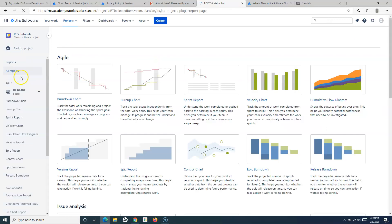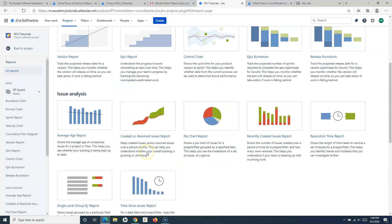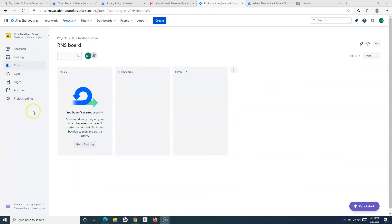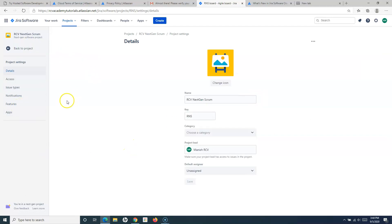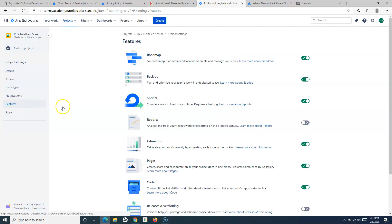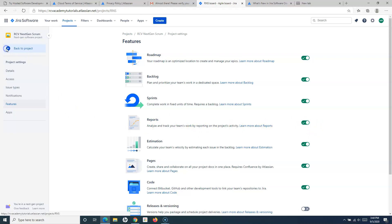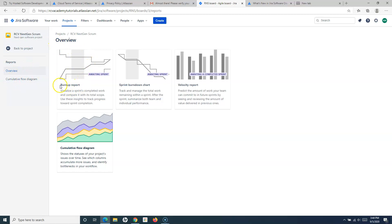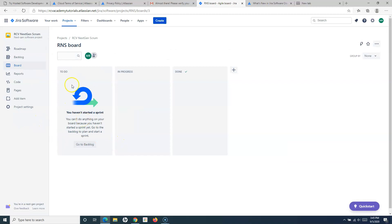If I go to Reports in the classic project, all the reports available in the server version are also available here. But if I switch to the next-gen project, reports are not enabled by default. To enable them, go to Project Settings, then Features in the left-hand side, and enable Reports. Once enabled, four reports become available: the burn-up report, sprint burndown, velocity report, and cumulative flow diagram.